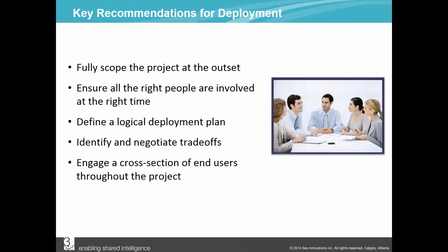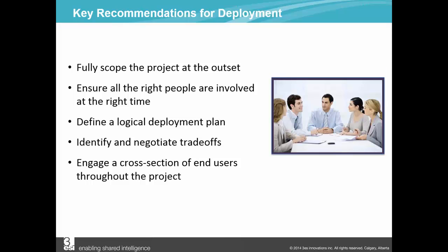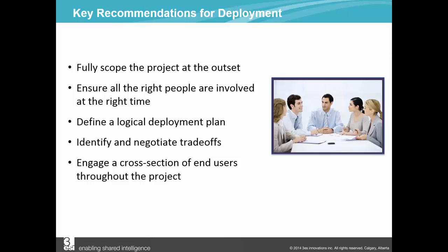The first of which is to ensure that we fully scope the project at the outset. As we evolved the requirements of this solution, what was required progressed. There were 6 key business deliverables that we had initially agreed upon as being the requirements of the future state. That started out with only 3. But in further defining what the solution would look like and what the needs of the business truly were, the requirement list doubled. Based on that, the scope of the project also expanded.